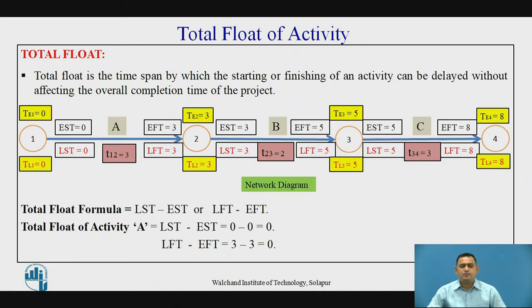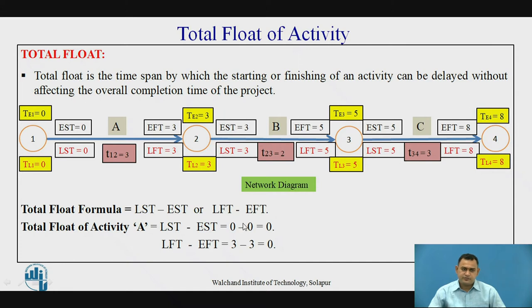Now let's see them one by one. Total float is the time span available with the activity by which the particular activity can be delayed without affecting the overall project duration. The formula for total float is: latest starting time minus earliest starting time, or latest finishing time minus earliest finishing time.